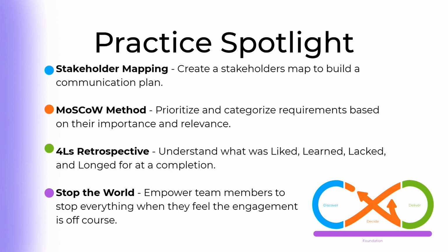So is that something that you really do want, but it's not critical? You could take it or leave it. And then you have your won't have. That is where it's actually out of scope or it's just not going to be done this time around. You may park it for a later date, but what you're focusing on now is not that. And this MoSCoW method really enables you to see clearly what your direction is and decide where to start. So you know your must-haves is absolutely what you've got to start with.